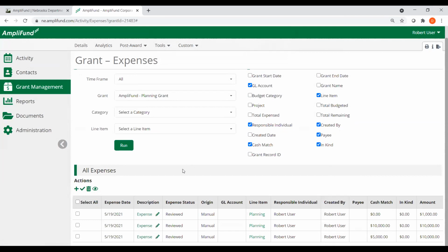The best practice, or the required route, when entering expenses is to first spend your required match funds, then expense the grant funds, and after that, whatever match you have left over. It's probably a good idea to have a couple of ways to keep track of how much you've already expensed against your match funds and against your grant funds.